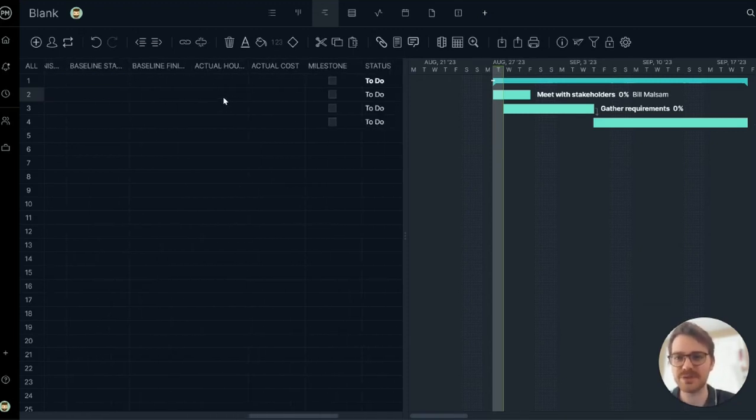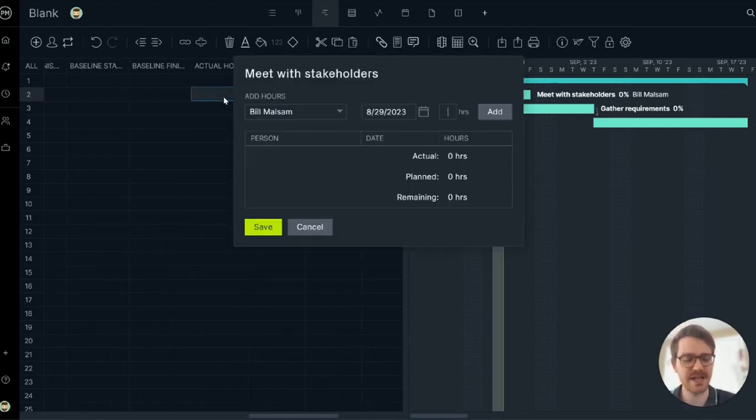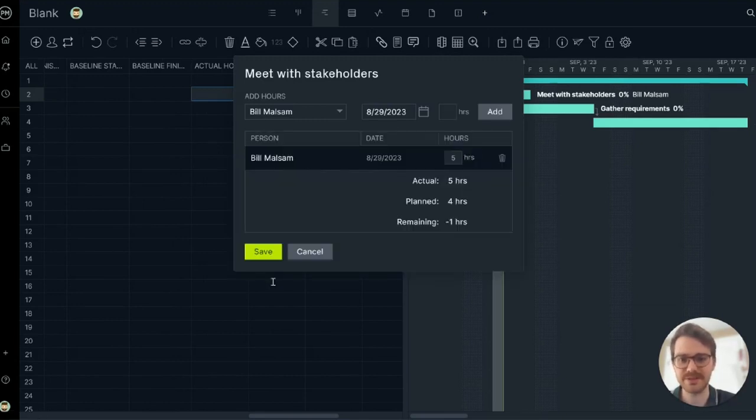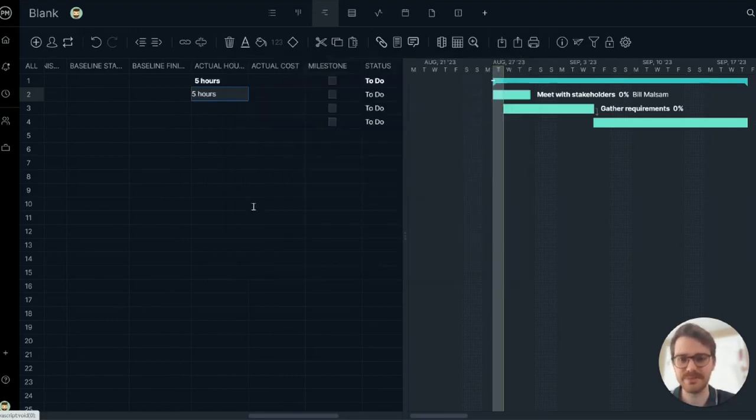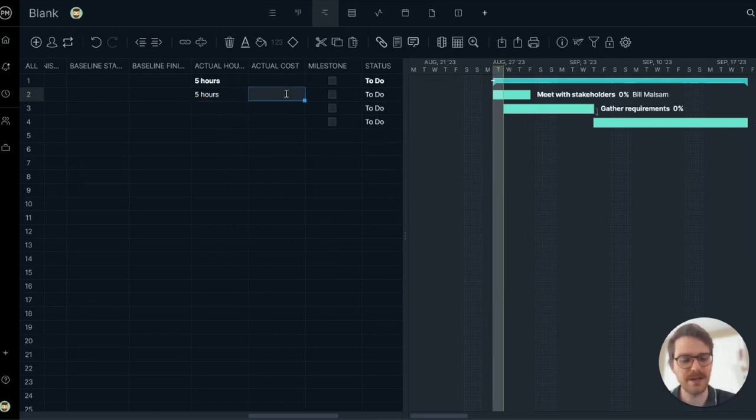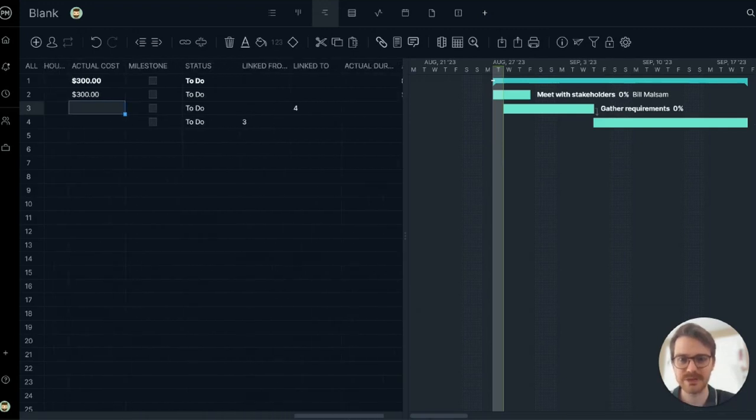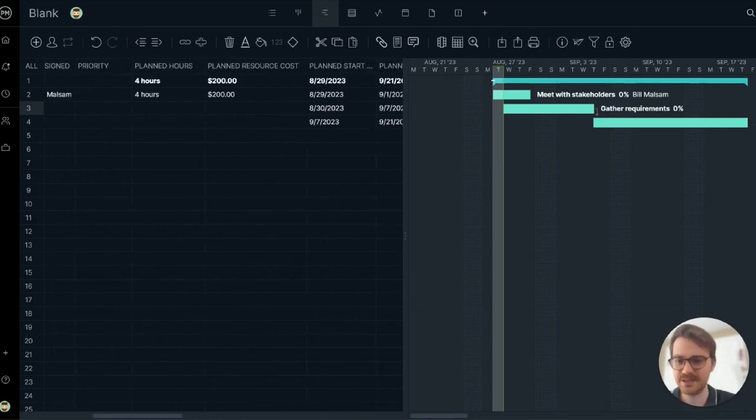Same thing with the actual hours. Let's say it actually took them five hours to do it. Let's add those hours. Excellent. And update the actual cost by simply highlighting the cell and entering some data. So it's quite easy to use.